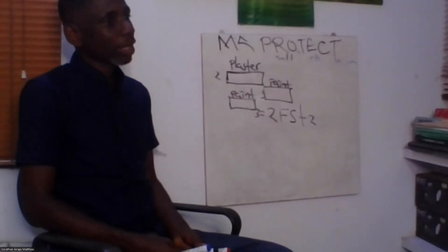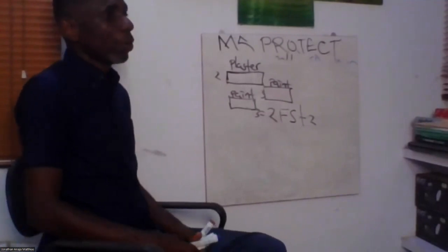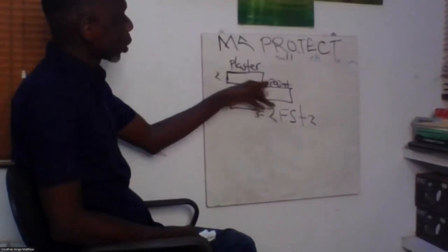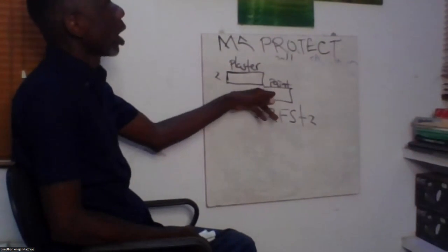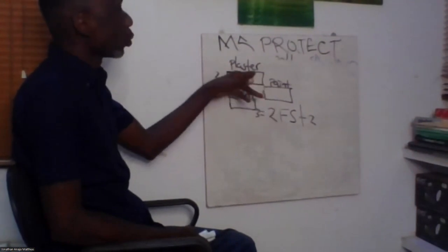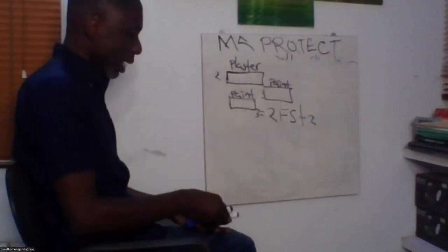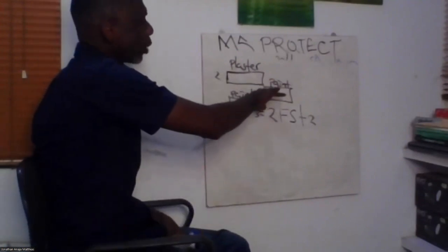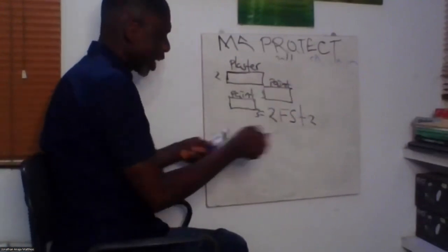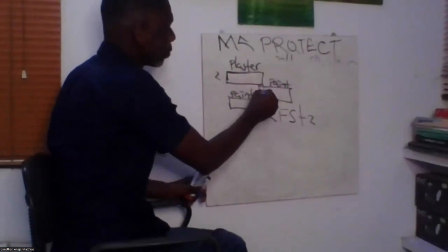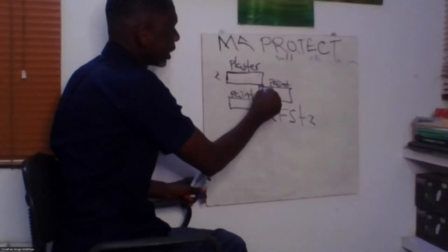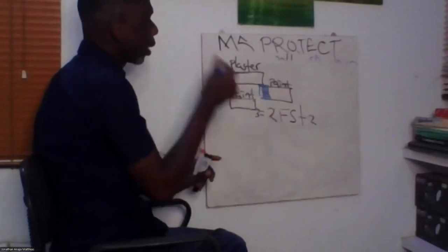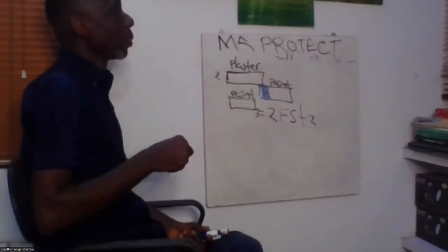If they're on the critical path, then you may need to just look at your project and see how these are parts of the activities. You may not be able to compress or do anything. But if it's a critical part, you cannot push forward, but you can schedule a whole lot of activities to start before then. For example, the time in between, you can use it for scrubbing, mixing, preparing your surface.